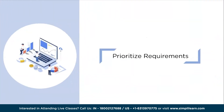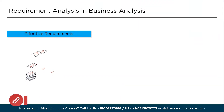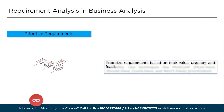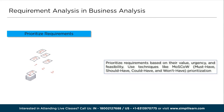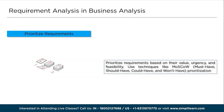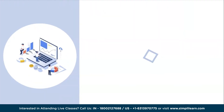Step 9: Prioritize Requirements. Not all requirements are of equal importance. Prioritize requirements based on their value, urgency, and feasibility. Use techniques such as MoSCoW — Must Have, Should Have, Could Have, and Won't Have — or the Kano model to categorize requirements based on their impact on project success and stakeholder satisfaction. This enables efficient resource allocation and ensures the most critical requirements are addressed first.